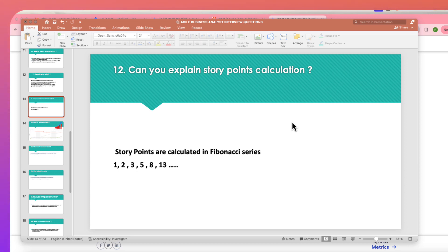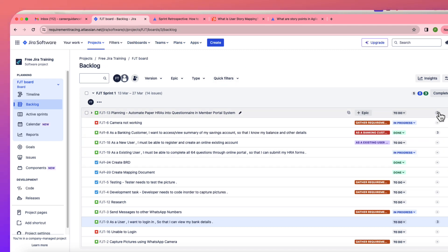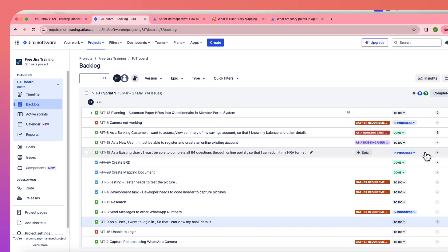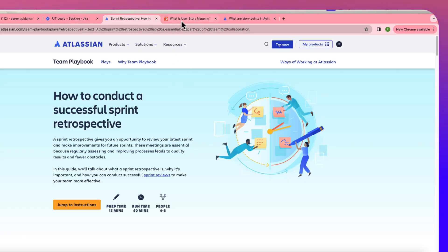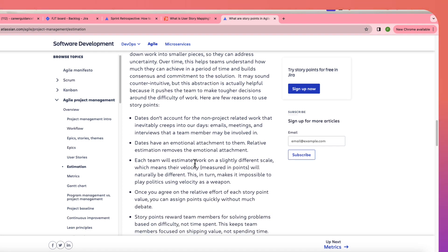Story points are always calculated in a Fibonacci series: 1, 2, 3, 5, 8, 13. Every story gets points based on how much effort it will take. If you don't know how to assign points — because a story may look simple but actually take longer — that judgment comes through experience.